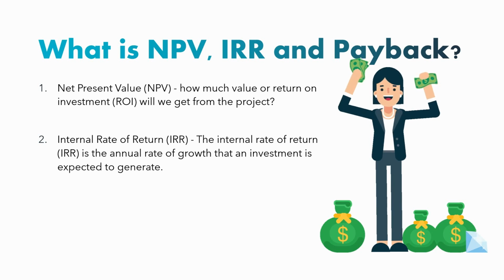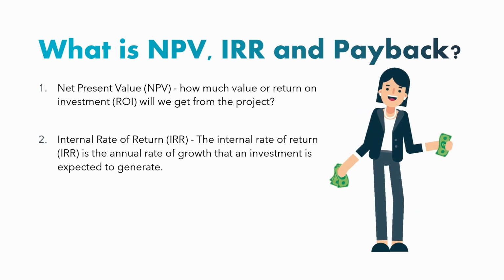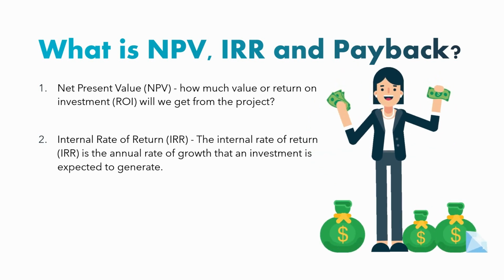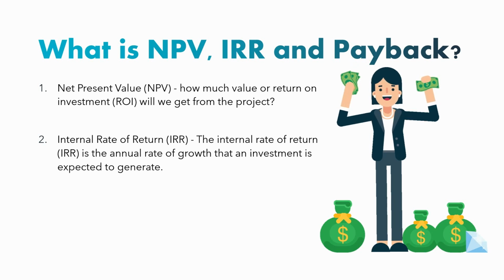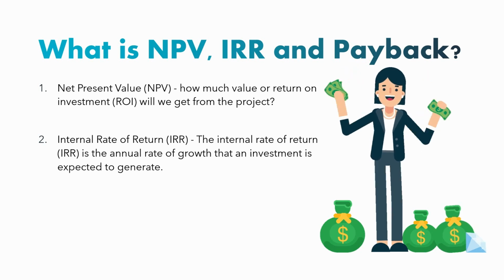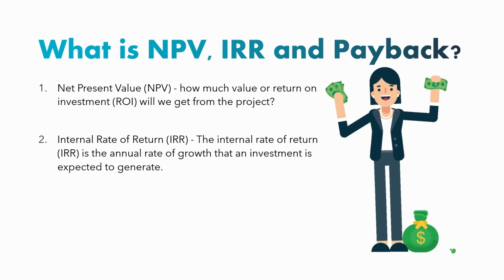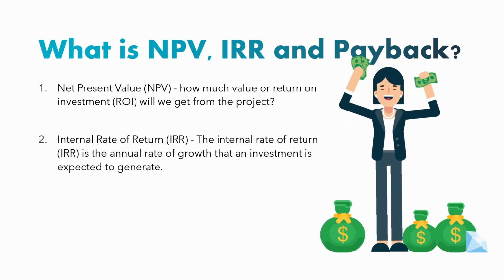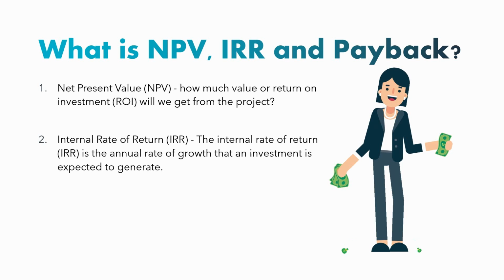The internal rate of return is the annual rate of growth that an investment is expected to generate. The IRR is calculated using the same concept as the net present value, except it sets the NPV to be equal to 0, as in the IRR shows the actual discount rate that would set the NPV to 0.